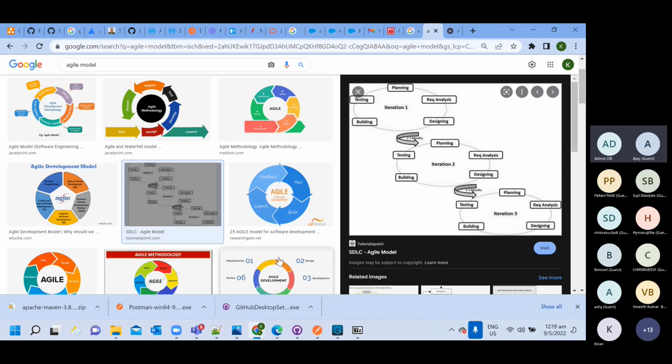And when they create stories, they will calculate, okay, this many stories we can cover. Means the developer will also have some capacity, how many story points he can deliver. And at the same time, each Jira story will also have some story points. For example, there are 10 or 20 Jira stories. Based on the complexity of that story, story points will be assigned to each Jira story. For example, if that is a very small change in a property file, and after that we need testing of that API, that will get one story point.